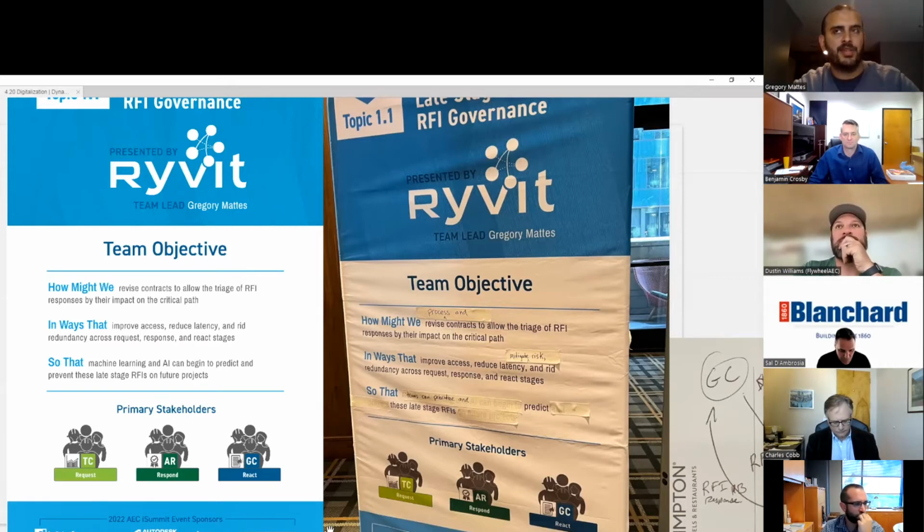But the challenges were that an RFI can look different on one project, and an RFI can look different for different stakeholders on the same project, right? What the GC enters into Procore is not necessarily what the architect cares about in Newforma, right? And the architect in Newforma may be just going off whatever is in the contract of, I need to respond to this thing within 10 days. And there's no real prioritization of these RFIs. And that's a big problem, right?